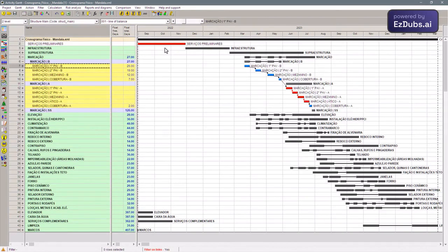Because the CPM planning proposal has a logical network and I can only do it as early as possible here and here. So with this I do it as early as possible. There are some gains in terms of risks of delay or rescheduling, but it gives me as a resource manager a problem, which is a team stoppage, assuming of course that the team that schedules is a team other than the team that fixes or a group that does plastering. These are specialized groups.